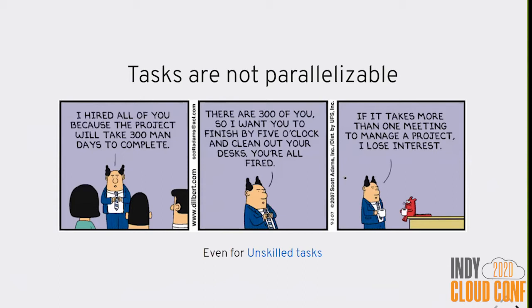So the smart answer, therefore, is, all right, let's get 100 friends together. Everyone carries 1 box, we'll be done in 30 seconds. Clearly, that doesn't work. Not because they didn't have 100 friends, they did. But we only have 1 elevator. We only have 2 dollies. There's only so much packing tape. There's doors that only fit one person at a time.